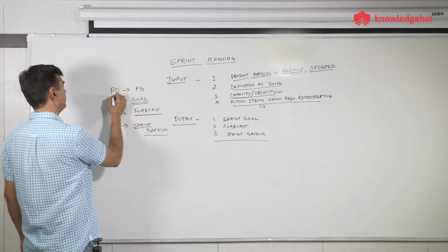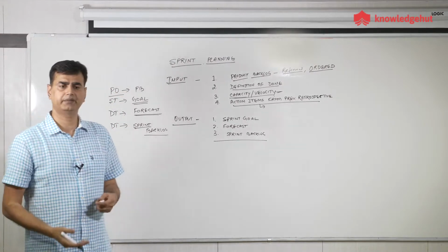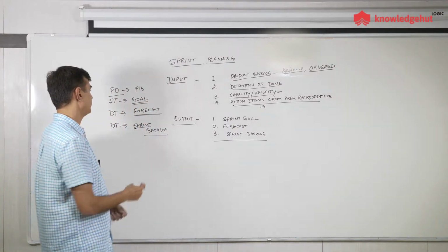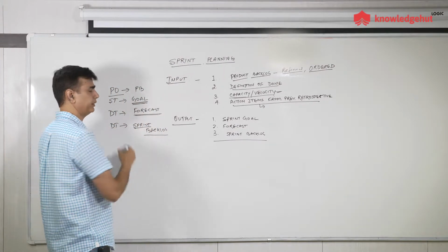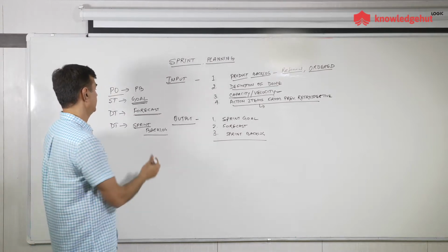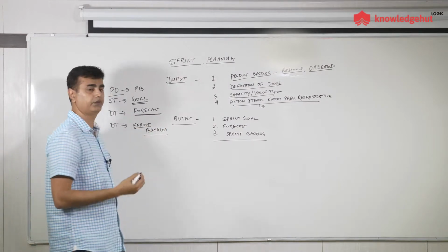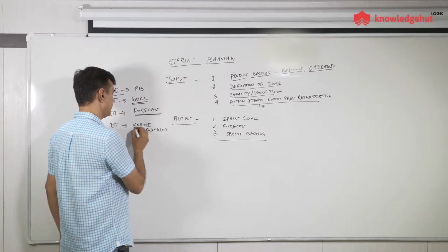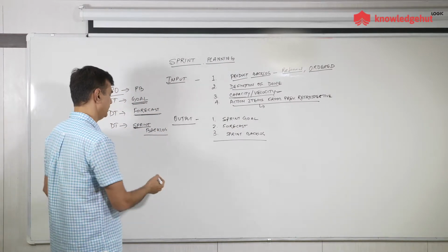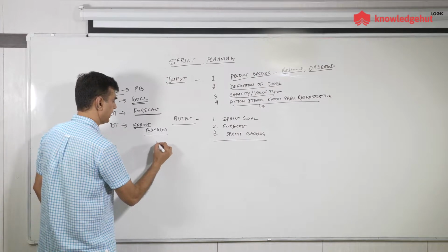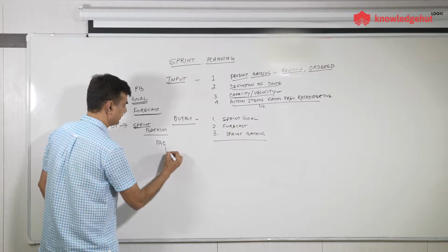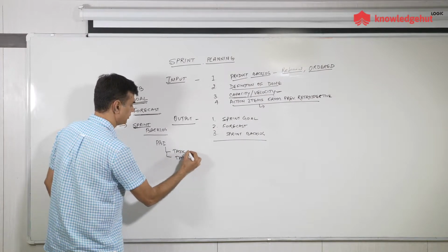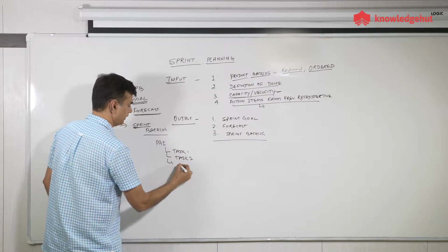So these are the three things, and this is the order in which they get executed. Now, the PO proposes a sprint goal, but can the team go ahead with the same goal the PO is expecting? May or may not; the goal can get negotiated here depending upon the team capacity. Forecast is also usually not about the individual, it's about the team. A sprint backlog consists of the amount of work, usually PBIs, and PBIs get further split into multiple tasks, so we have task 1, task 2 and so on.